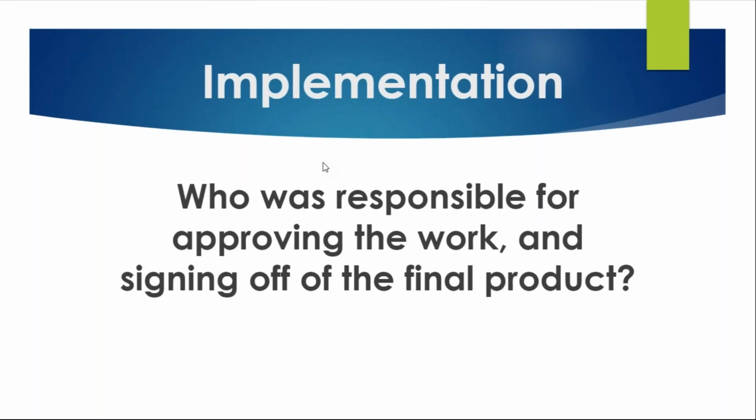We typically have sponsors or system owners for all of our system applications that are in our inventory, followed by product owners, which is my role, and then data owners, and then our IT support. We do 4 releases per year with a 2-year product backlog, so we're constantly moving things through different stage gates and development releases. As we go through each scheduled release, we do about a 2-week testing period, followed by a week of UAT that involves us as the ownership of the application with a predetermined UAT collective.